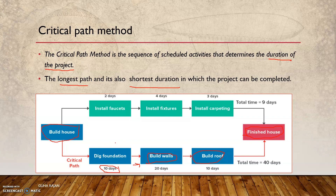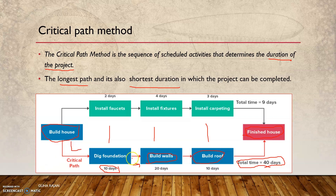Similarly, during build roofing you can do the carpeting as well. These activities are not on the critical path — only the activities that determine the total duration are. If you look at it, the total duration of the project is going to be 40 days. The faucets activity of about 9 days can be fitted anywhere among these activities and doesn't impact the schedule. Only whichever task or activity is on the critical path is going to impact the schedule of the project if there is a delay. For example, if dig foundation instead of finishing on day 10 spills over to day 11 or 12, you naturally cannot start the build wall activity — it will be pushed later.